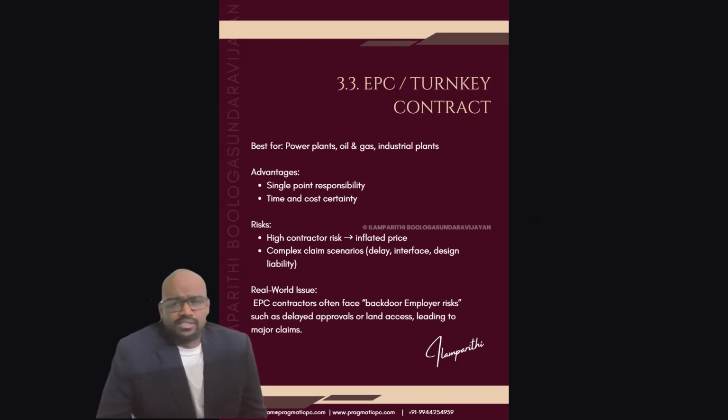EPC or turnkey contracts. We usually go with these for power plants, oil and gas, and industrial plants. That is the industry that uses the name EPC; they don't use the name design and build. The advantages are single point responsibility, where the contractor is the single point of responsibility, and time and cost certainty. Comparatively, it has better time and cost certainty than other contracts.